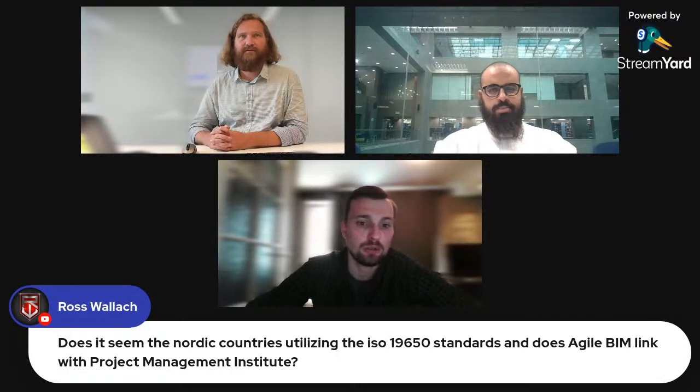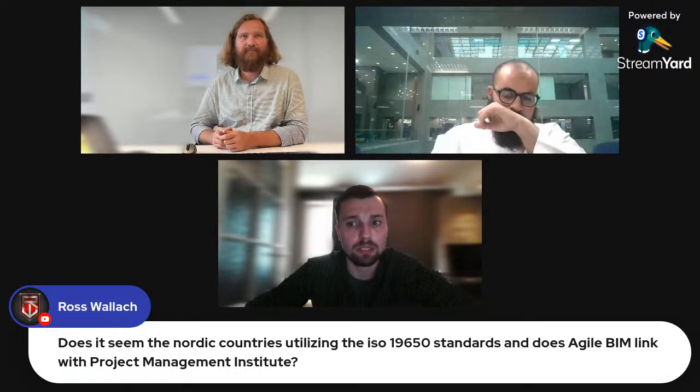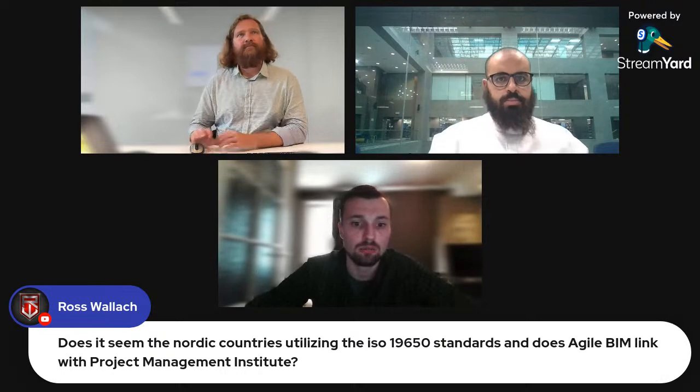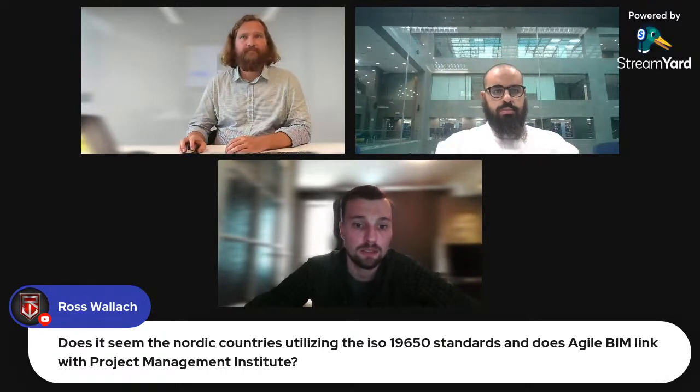Does it seem that all the countries utilize the ISO standard, and is it complementary? The ISO is also being used. We have different standards, but I see, for example, that this standard is starting to have a strong position. But with construction projects, if a project starts in 2018 and you are working on it for 4 or 5 years, you are not going to change the standard in the middle of the construction or design phase. So in Fornebubanen, we don't use the ISO 19650 standards, but we see that there is a movement in the sector.